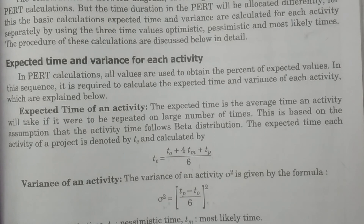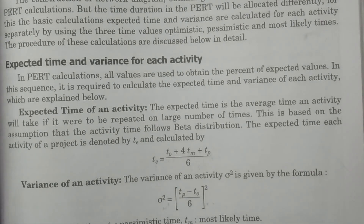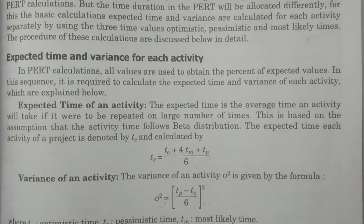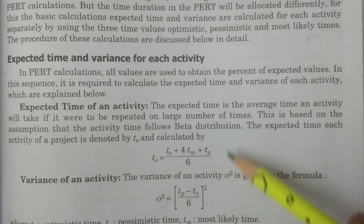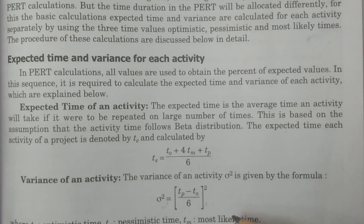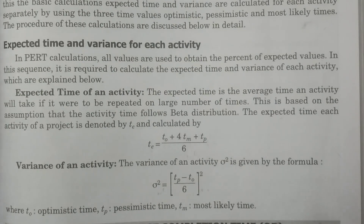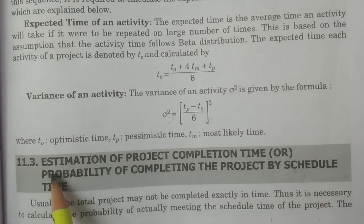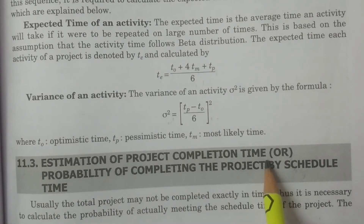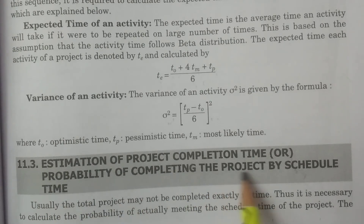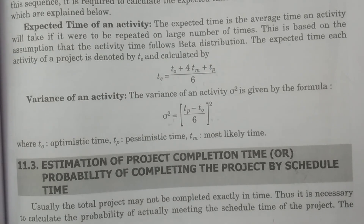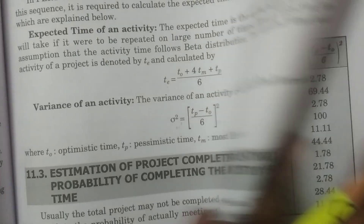The variance σ²E for the project is calculated for all critical activities by simply adding their individual variances. These are the expected time and variance calculations in PERT. One more important thing: we also need to calculate the estimation of project completion time, or the probability of completing the project by the scheduled time, both of which are calculated using the normal distribution.